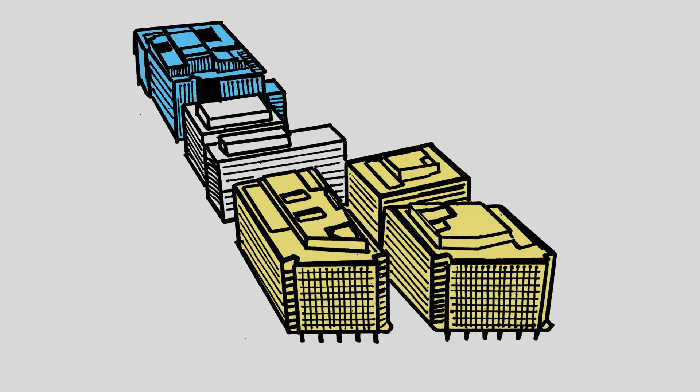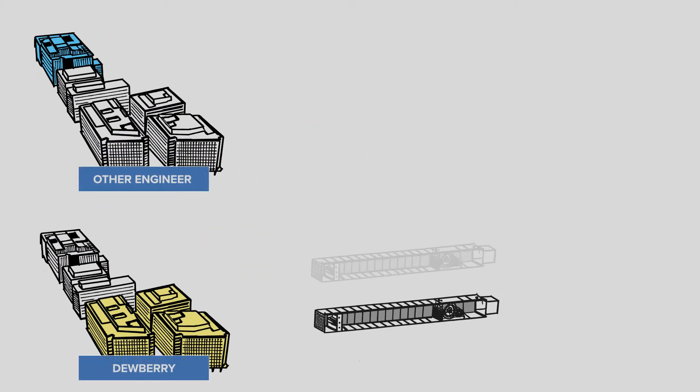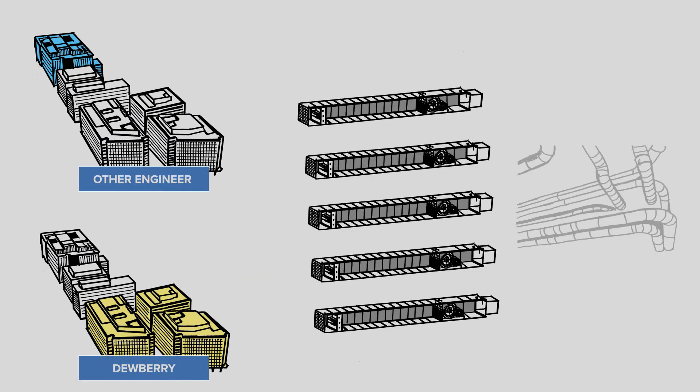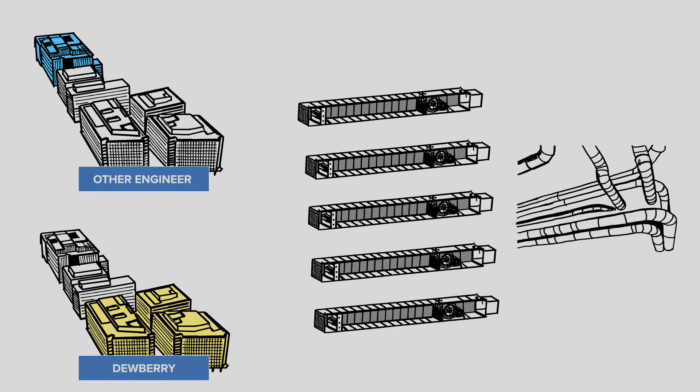We immediately pointed out that this design included five air handling units per floor, as well as a complicated scheme of ductwork over the highway that involved huge beam penetrations that came with significant costs.